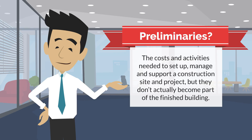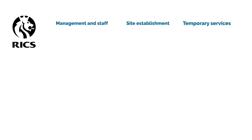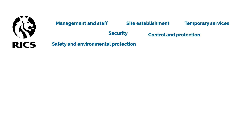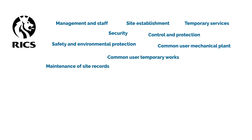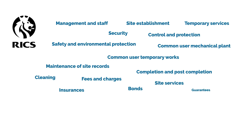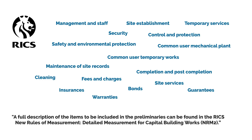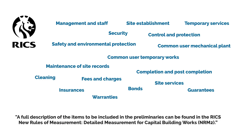But specifically, what are the costs included in preliminaries? According to RICS, this includes management and staff, site establishment, temporary services, security, safety and environmental protection, control and protection, common user mechanical plant, common user temporary works, the maintenance of site records, completion and post-completion requirements, cleaning fees and charges, site services, and insurance bonds, guarantees and warranties. A full description of the items included in the preliminaries can be found in the RICS New Rules of Measurement, Detailed Measurement for Capital Building Works, NRM 2.